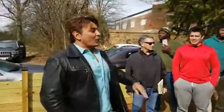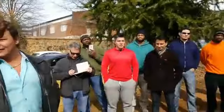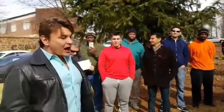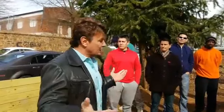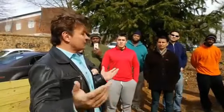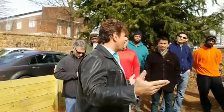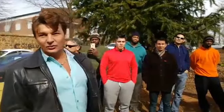Well, we got 8 sets of furniture, so a lot of investors asked us to list and stage their houses too. It's all a matter of, do we need it for something else? Supply and demand type of thing. But to answer your question, I will always leave it until the appraisal's done. You put a contract on a house on a Sunday, you might have the inspection on a Wednesday, then you got to address all the concerns on the inspection report. That might take a week, and then the appraisal's probably 10 days behind that. So furniture sits in there at least 2 weeks.